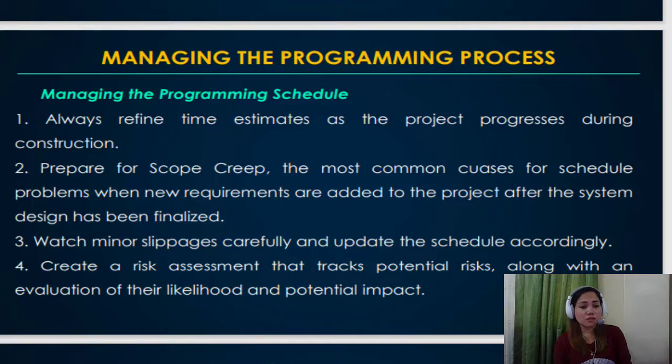Okay? Next, for managing the program schedule, you also have to manage your schedule. So you're always going to refine time estimates as the project progresses during construction. Second, you have to prepare for scope creep, the most common cause of schedule problems, when new requirements are added to the project after the system design has been finalized. Third, watch minor slippages carefully and update the schedule accordingly.